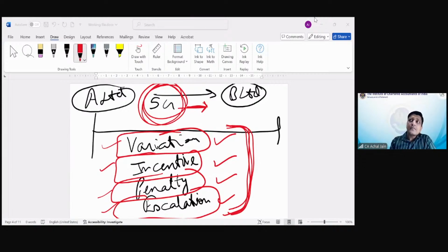Generally, because whether this percentage increase or the amount of increase, if you look at the amount of increase, it will not be practically possible for them to agree on. Of course, they can always put a range. So let's suppose if a 5 crore contract is there, maybe a range is put up that up to 1 crore is the amount of escalation you can get. But technically, generally, in terms of percentages, that is required to be looked at. So that's how it works.